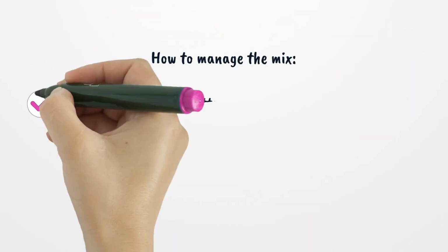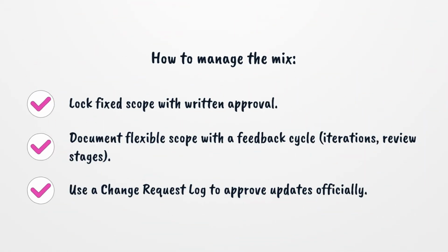How to manage the mix. Lock fixed scope with written approval. Document flexible scope with a feedback cycle, iterations, review stages. Use a change request log to approve updates officially.